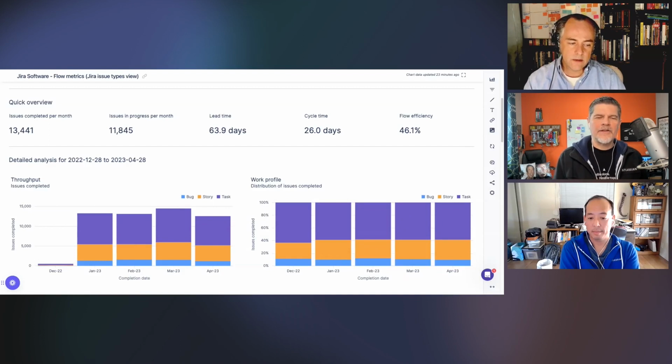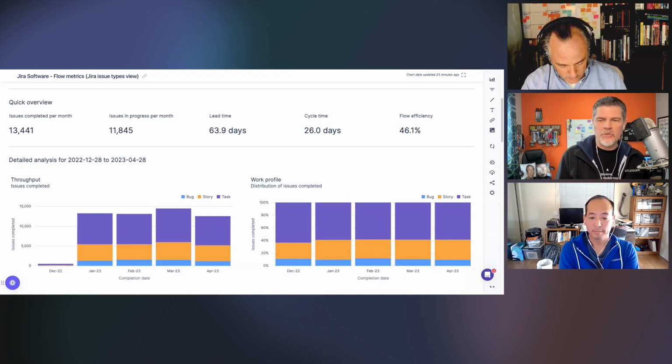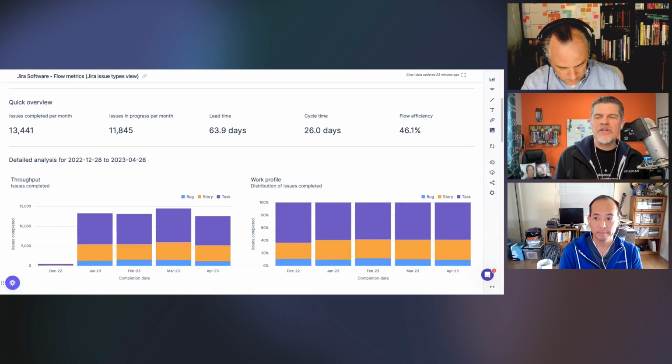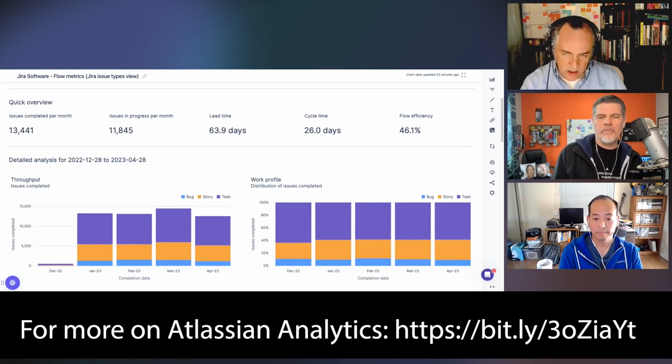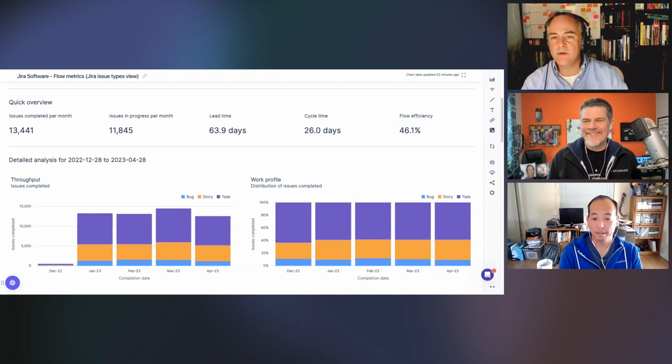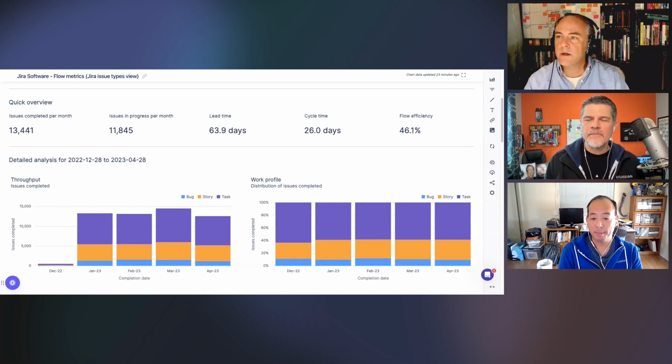There are levels of that. Within Jira, there's a Jira Epic, which you can rename now. If you want to call it a feature, you can. You can call it whatever you want. But the goal is to understand that a story is a child of that object, and then a subtask could be a child of that story object. So are task and story parallel in the hierarchy? Yes. I'm cutting this out of the interview, I'm just asking. No, they are actually parallel. Okay. All right. A subtask is a child of a story. Right. I usually say a subtask is something an individual could do in 30 minutes to 6 hours. A story or a task requires an entire team to deliver because you have to design, develop, and test. I think that's fair. Okay.